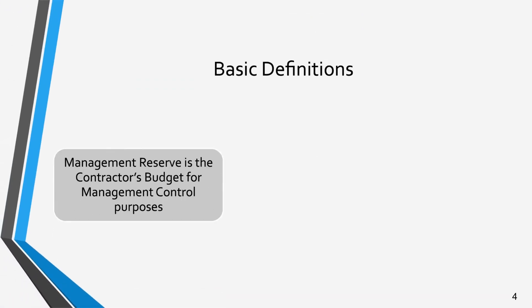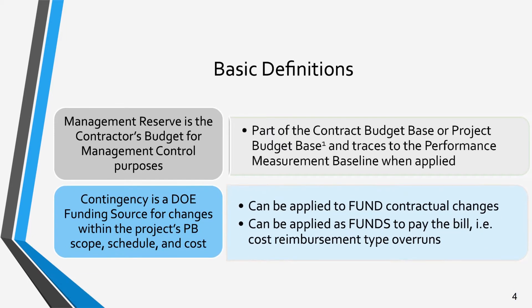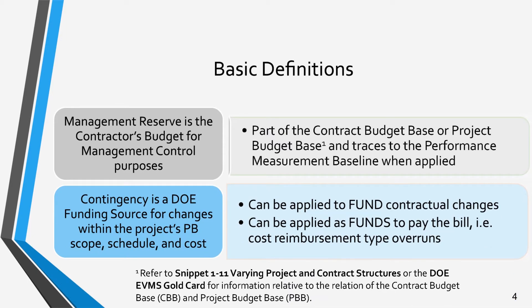Before we dive into the details of these concepts, we will provide some top-level definitions of each. Management Reserve is the contractor's budget for management control purposes. This budget is a part of the contract budget base, or project budget base, and is applied to the performance measurement baseline when authorized internal changes are made.